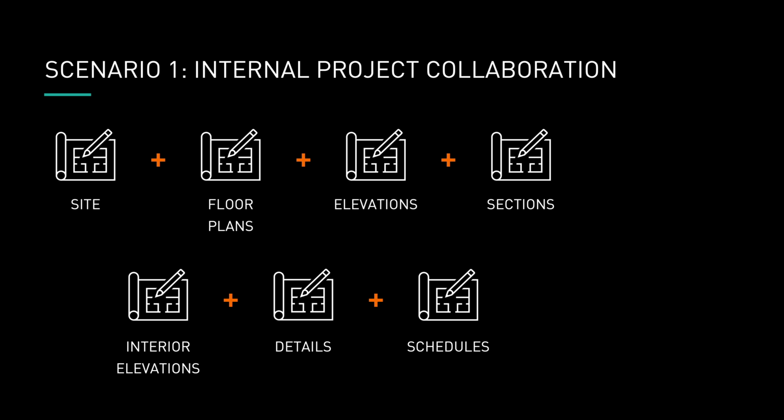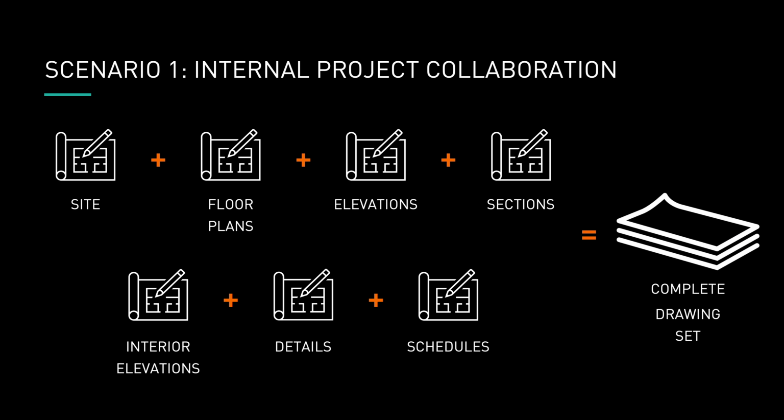This method, and working in 2D in general, doesn't lend itself to BIM because one of the key goals of BIM is to model the entire project in 3D and generate all drawings from that model. In a disparate 2D arrangement, changes that occur to one drawing are not automatically coordinated to other drawings, resulting in a considerable amount of manual changes and a high risk of inadequate coordination.